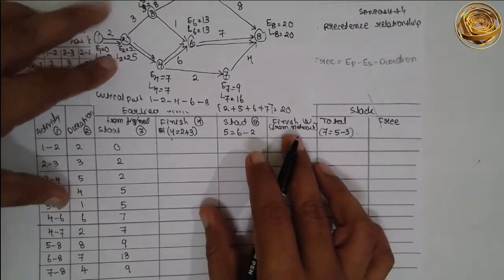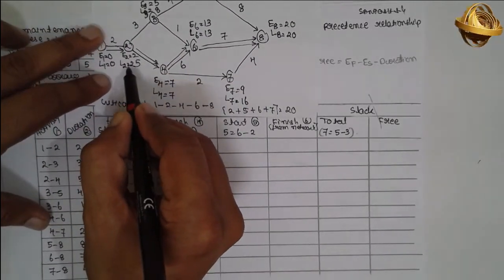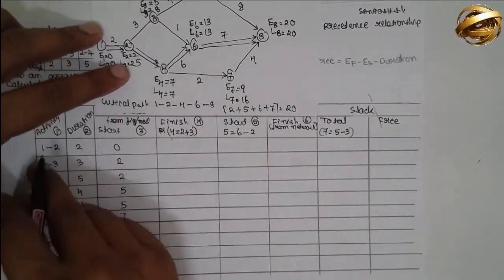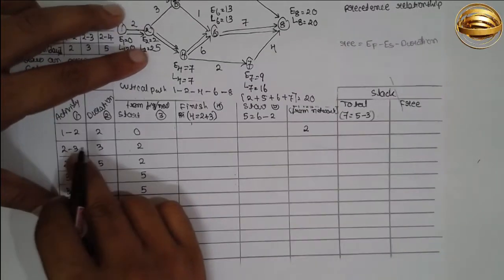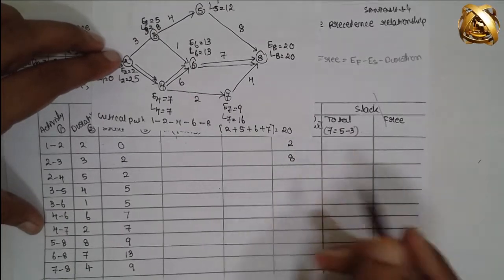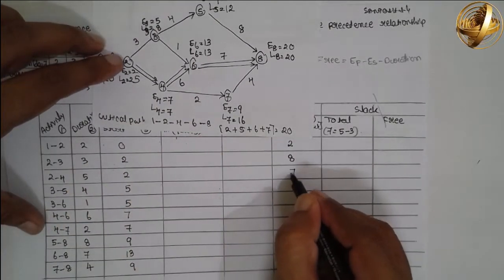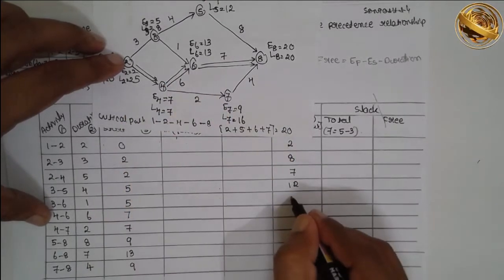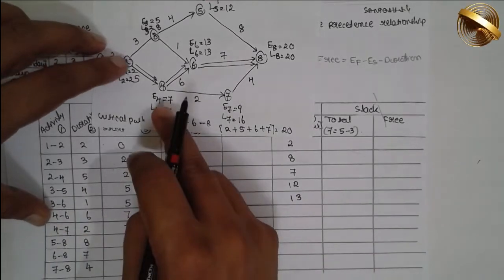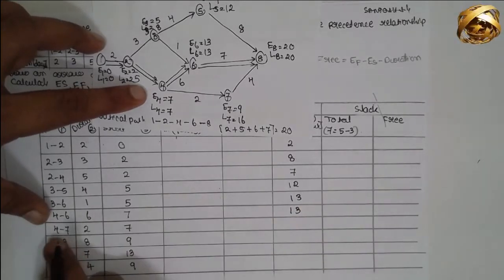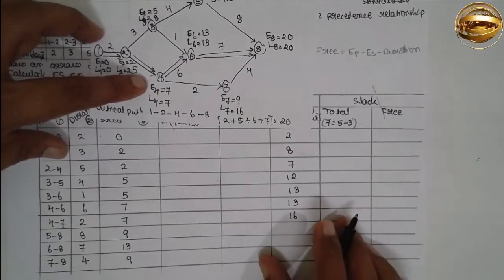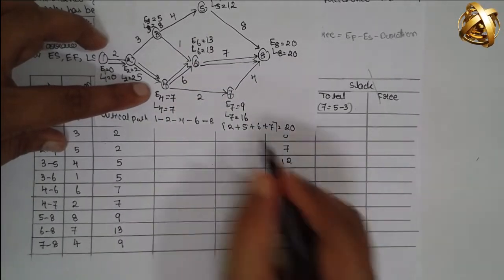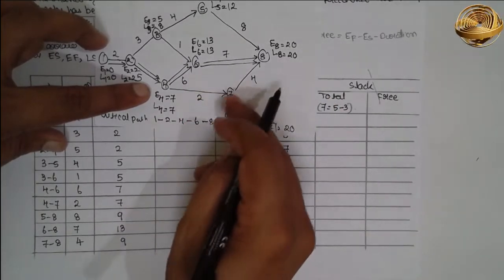Now, latest finish time from the diagram: for 1-2 it is 2; for 2-3 it is 8; for 2-4 it is 7; for 3-5 it is 12; for 3-6 it is 13; for 4-6 it is 13; for 4-7 it is 16; for 5-8 it is 20; for 6-8 it is 20; for 7-8 it is 20.